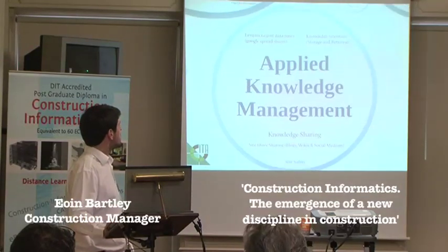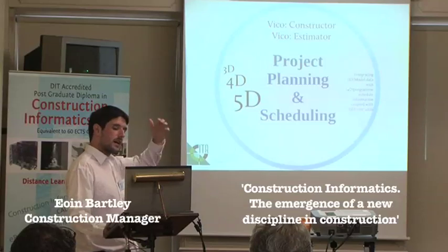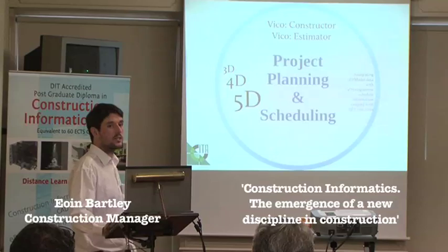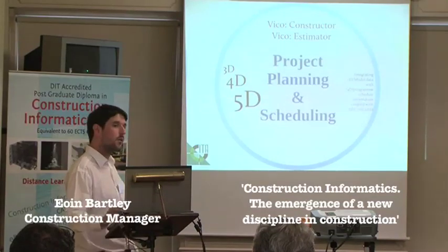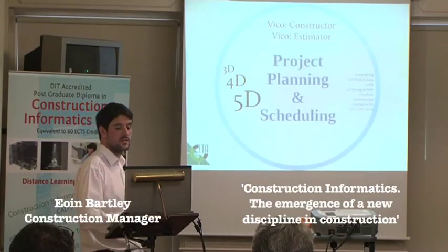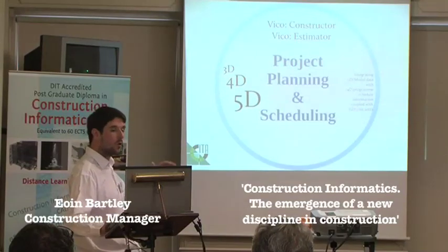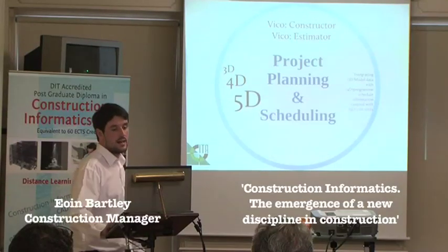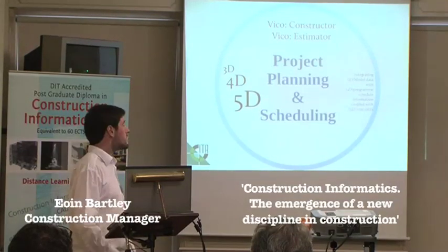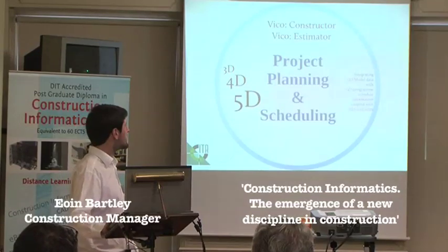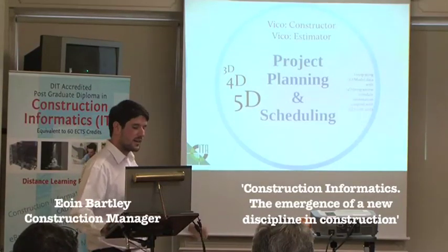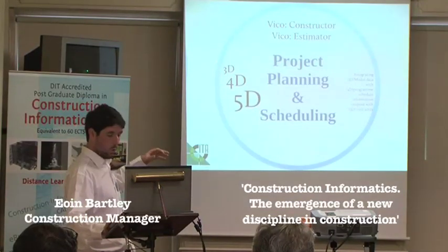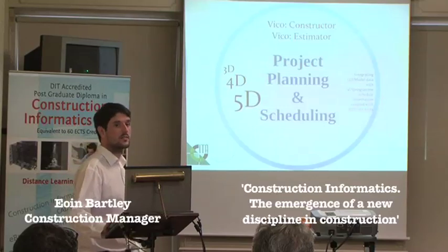Okay, project planning and scheduling then goes back to BIM, but using BIM with 4D information, time from scheduling. Any scheduling information that someone might have planned, you can import from, say, Microsoft Project or Primavera, and import that. For this particular one, in this course, we used Constructor and Estimator. And what that allows you to do, with the pricing per model element, gives you a fairly accurate representation of what it's going to cost over time.